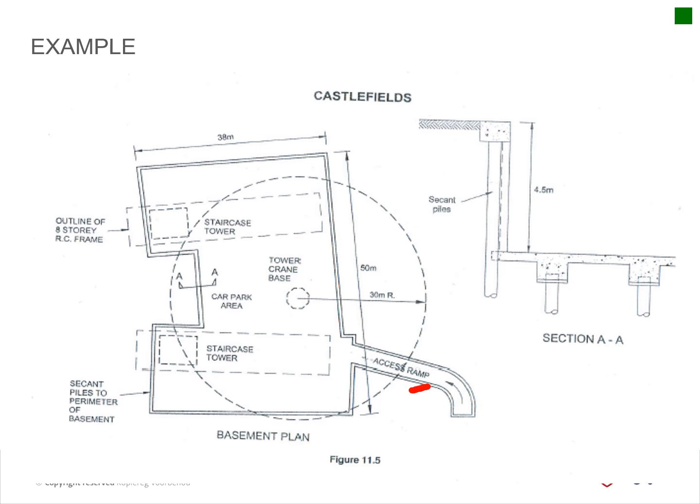And then there will be a pedestrian access via scaffolding access towers. The volume of the excavation material is approximately 9,800 cubic meters, and the program duration for the works is 4 weeks or 20 days. Okay, so then they can calculate, okay, I need X amount of trucks coming in. So you will see that on page 250, where they actually do the calculation of machine output. There's 25 loads per day that they have to take out.